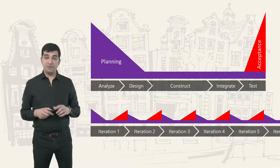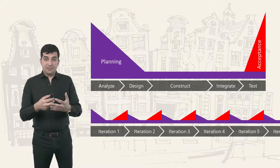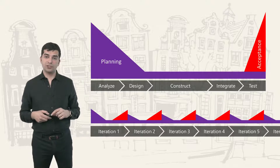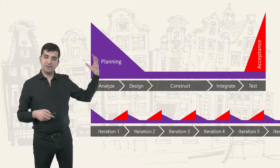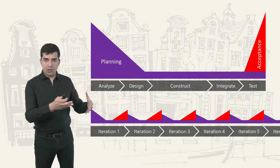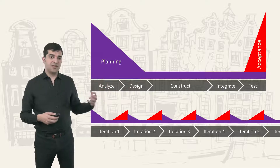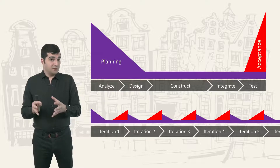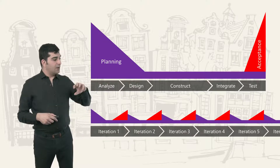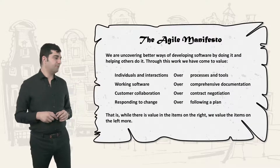When we say customer collaboration, it's not just that we believe it's a good thing — more importantly, we must have it in agile projects. In a predictive system, the upfront plan helps us find our way. In adaptive systems, we don't have that; we must adapt to the environment, which requires constant access to the customer and lots of acceptance tests during the project. So if you want an agile project, you must make sure your customer is also ready to support this way of working. That's a big challenge.